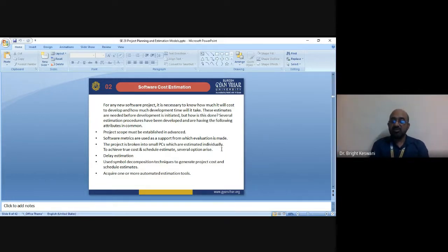Once we have the estimates of the effort and time required for the different phases, a schedule for the project can be prepared, and this schedule will be used later to monitor the progress of the project. So, according to the COCOMO model, you can see easily that 19% of the time in all types of projects can be devoted to the product design phase, but it varies in product programming from 63% to 51% when going from small to large projects.